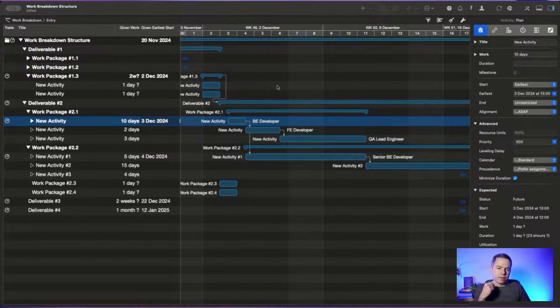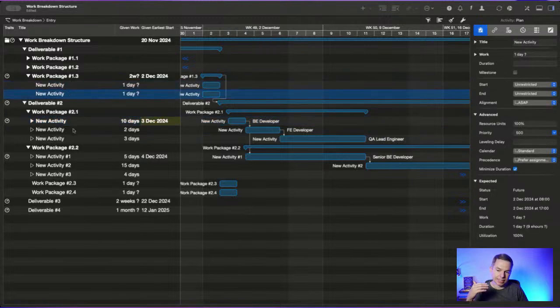So don't jump the steps. Always follow the correct way to create the schedule here. It starts with identifying tasks, assigning specific people to those tasks based on their personal working calendar, with their vacations, if you know about them, with national holidays and stuff like that. Assign all the dependencies, only then start moving things around. And that will save you a lot of time.